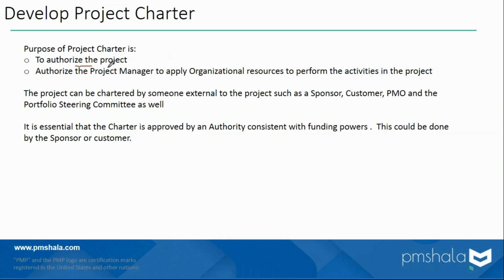Look at the second one also. It says authorize the project manager for the project. So the second point means without the charter, the PM doesn't have the authority to seek resources, deploy them, and conduct any work. Only when the charter is given would the PM have the authority to get and deploy resources and conduct any work. That's what it means.